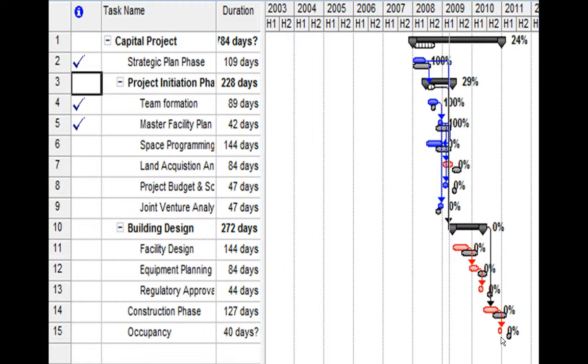As we can see, to reiterate again, in this Gantt chart, the blue line shows the actual activity, and the gray line shows a baseline planned activity. The red line shows the critical activities to be completed. By looking at this Gantt chart, it becomes evident that the project ended earlier than expected. 784 days is the project duration based on the performance shown thus far.